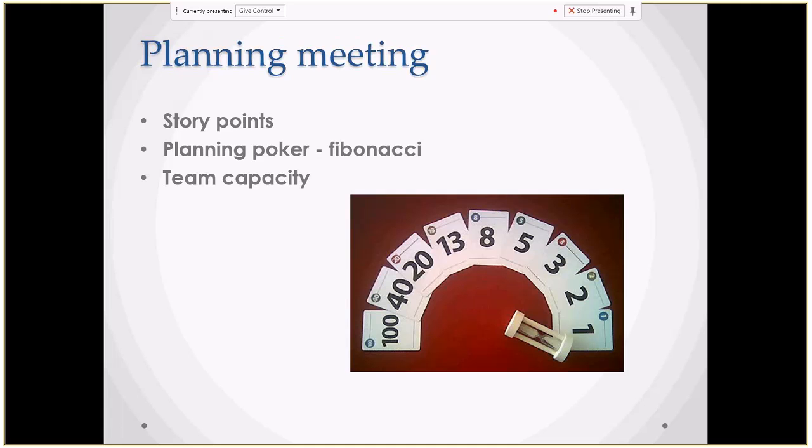So when you are considering story points for a particular requirement, let's see, implementing a main menu, just a requirement, a very high level one. When you are considering that, we can put any story point there. But when we are taking it, the first three are low effort, the next three medium effort, and 20, 40, and 100 high effort.